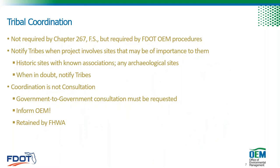However, it is FDOT's policy that tribes be informed of projects that may affect a historic resource of importance to them, and we want this to occur regardless of the funding source. There are two main reasons for this: first, we want to build and maintain productive working relationships with our tribal partners and keep them informed of all relevant projects, not just federal ones. Second, we want to prevent significant scheduling delays should a state-funded project get federalized. Sites that may be important to tribes include historic sites with a demonstrated association with the tribe, or any archaeological site with a pre-contact or prehistoric component. We cannot determine what is important to tribes — only they can — so when in doubt, it's always best to inform the tribes and get their opinion.